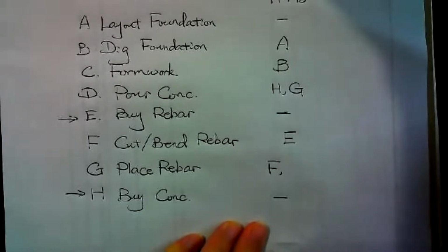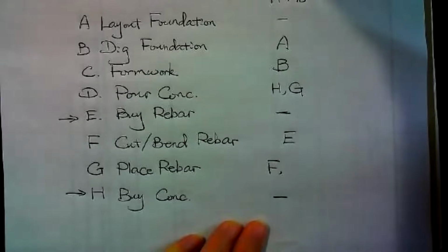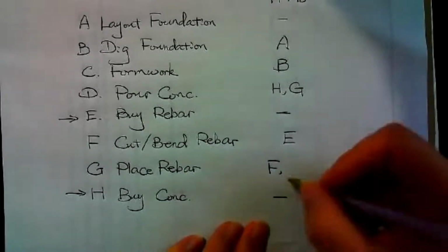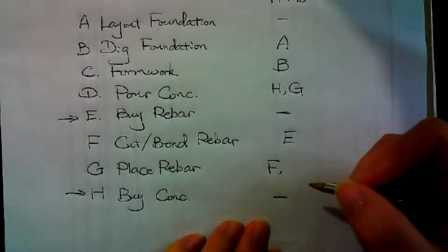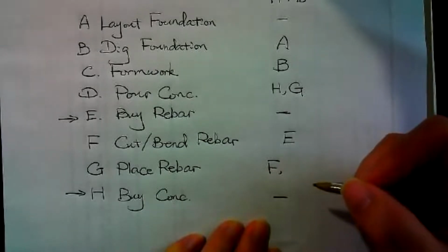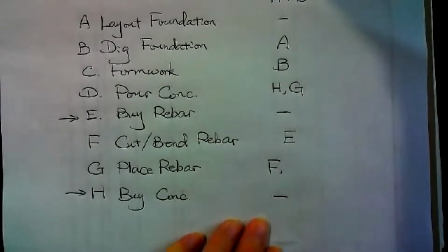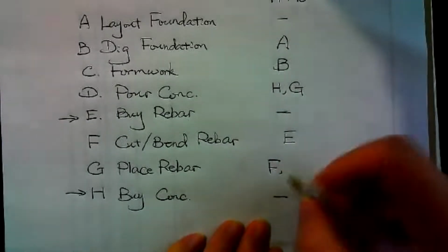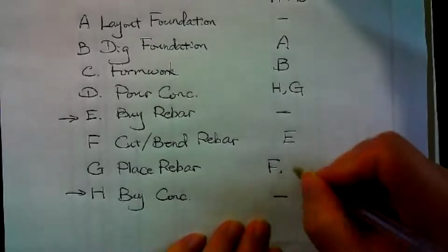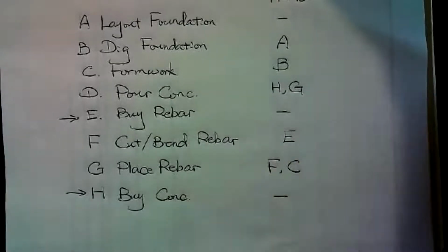See the picture? See the picture of the node? I need to get the rebar ready, rebar cut and bent. And also you need formwork. Formwork is ready, because after you put the rebar over there, you can't insert the form anymore. Okay, that's a very good point. Very good point. So we need the formwork ready before that. So C is over here.